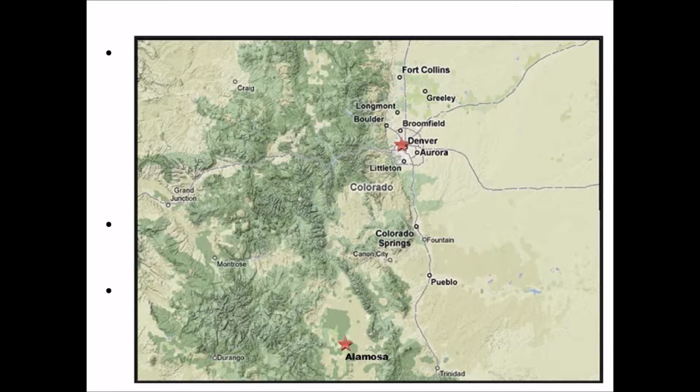And what this does is identify lessons learned from the adaptations and solutions that met the response challenges. So the root cause analysis model includes a number of components: response challenges, objective or goal, immediate causes, contributing factors, which are the root causes, and the lessons learned of the adaptations and solutions.